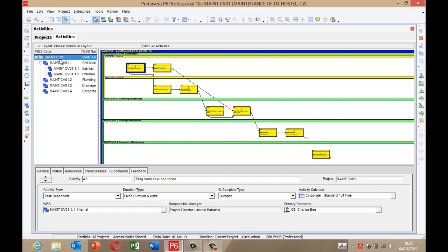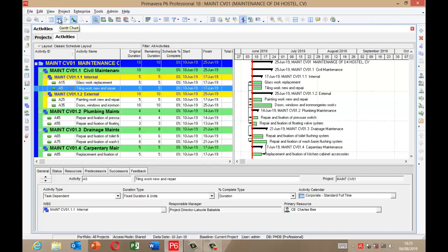After you have created your activity relationships, the next step is to schedule. Remember, scheduling will require you to state each early start and early finish date for the activities. Scheduling also will require you to calculate the longest path to determine the critical path. So when you are done, we go straight to scheduling our project.